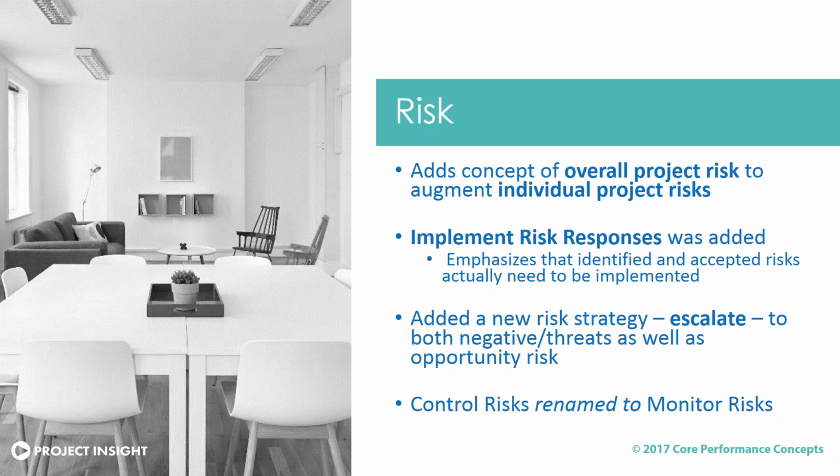So I know that that's out there, the tendency, and we all kind of get caught up in that. But really, they are emphasizing that you identify them, quantify, put them in your budget, of course, document them, put your risk register together, and then track, monitor your strategies, implement the strategies. And that's so important. So I'm really happy to see that they're emphasizing that the risks that you identify and that you accept actually need to be implemented. We all know that. So I'm really glad to see that this new process is added to emphasize that.